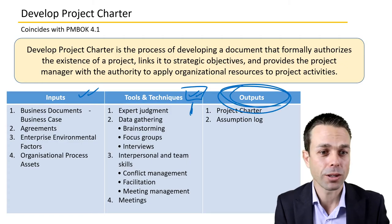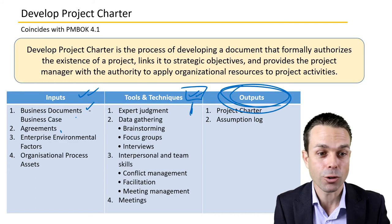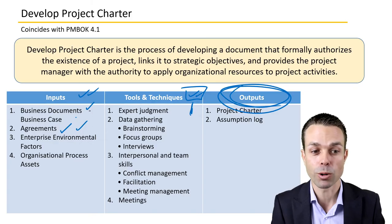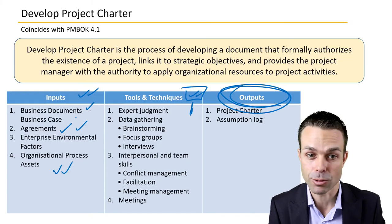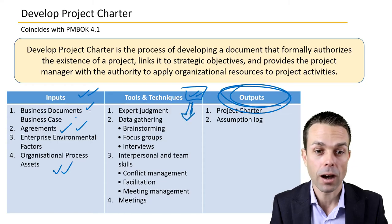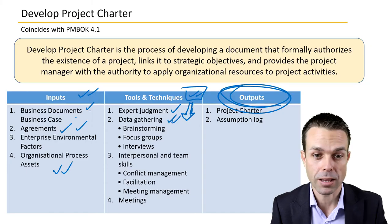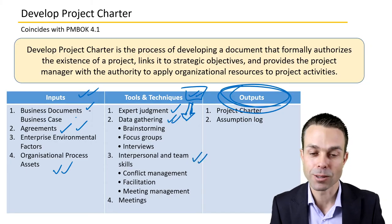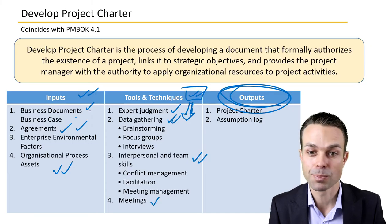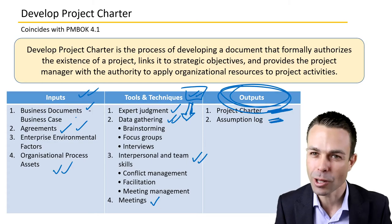First, the inputs: we're looking at business documents and the business case, agreements that have been made, and the enterprise environmental factors and organizational process assets — so templates and that sort of thing. The tools and techniques are expert judgment, data gathering to help put it all together, interpersonal and team skills to manage those initial meetings, and meetings themselves. The output is our project charter and the assumption log.